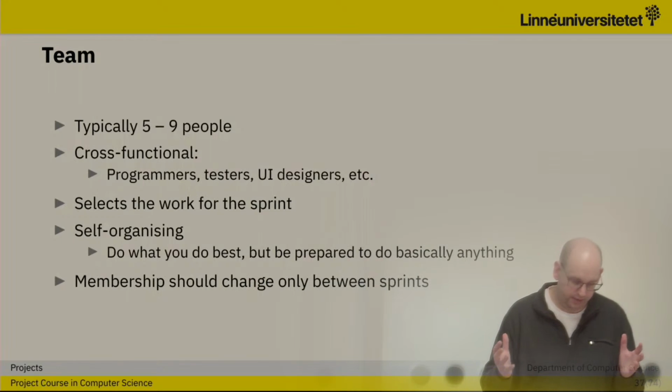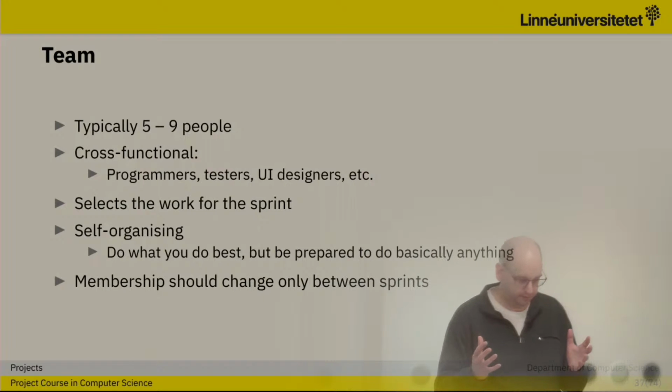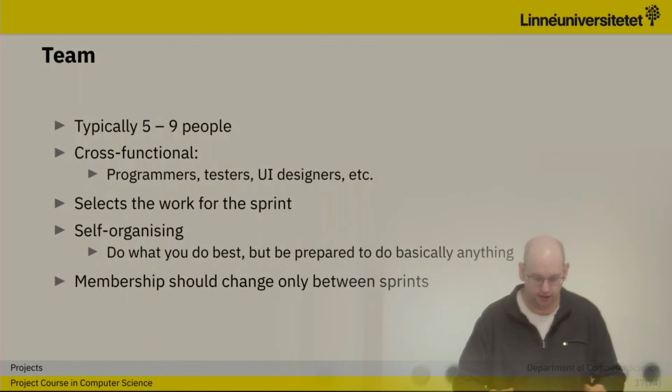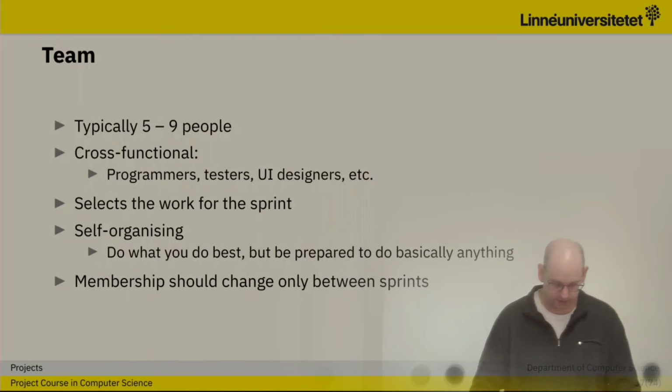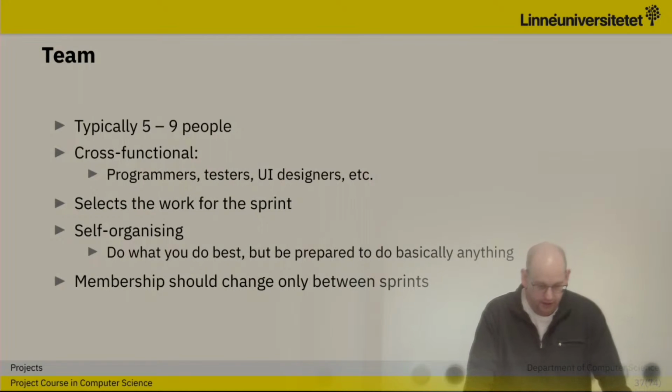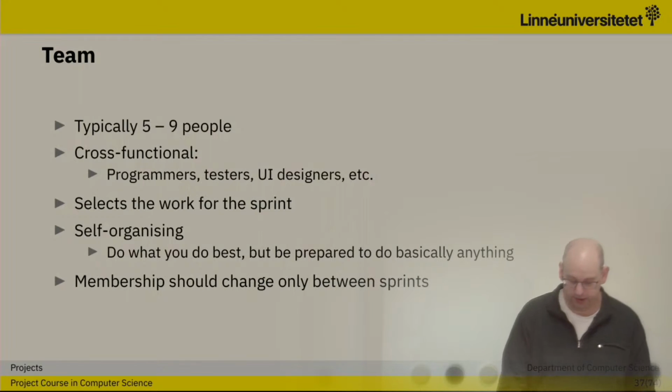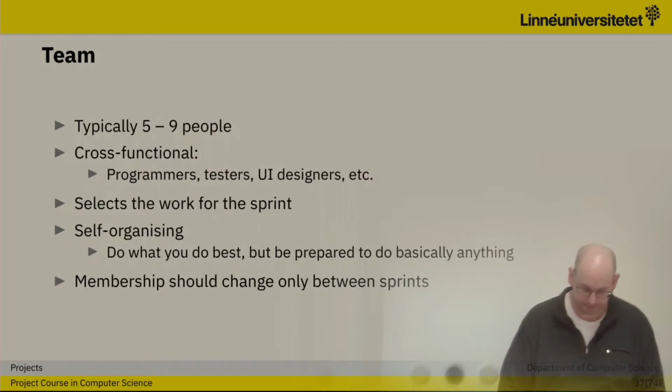And by doing that, you also find yourself closer to the project and the product, and see it as yours, so to say. The team selects the work for the sprint, self-organizing, as I said. You do what you do best but are prepared to do almost anything. And membership should only change between sprints, and preferably not at all. So everyone should be involved all the time.